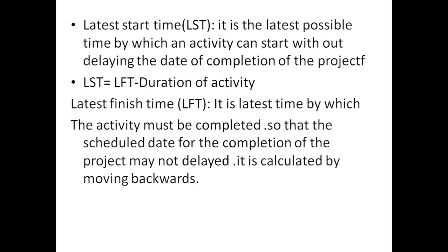And what is LST? Latest starting time. Latest starting time is the latest possible time by which an activity can start without delaying the date of completion of the project. Latest starting time equals LFT minus duration of the activity. That is, what is LFT? LFT means latest finishing time.